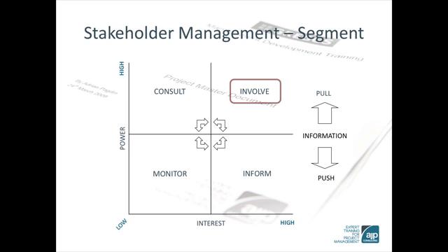Where do you think the sponsor of a project normally sits in this model? If you thought consult, then you were right. High power, but low interest. Now that doesn't mean they don't care about the project. What it means is that on a day-to-day basis, there are other issues, projects, business as usual activities that have a higher priority than our project.